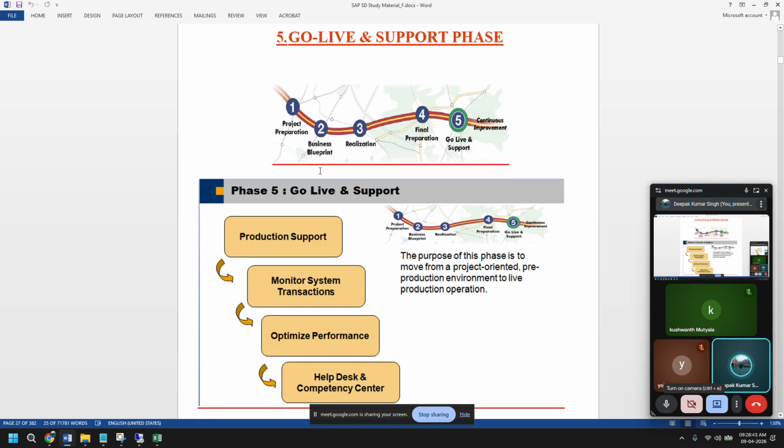Now when will this problem be caught? It will be caught only in the go live, right? Now it's very difficult to correct the data, because 18 months or 12 or 16 months have passed already. So that's the big disadvantage of this SAP methodology. If anything goes wrong, you don't have time to correct it. This was the biggest disadvantage in SAP. So that's why SAP now recommends going for agile methodologies. What is agile methodology? Now this whole concept is gone.